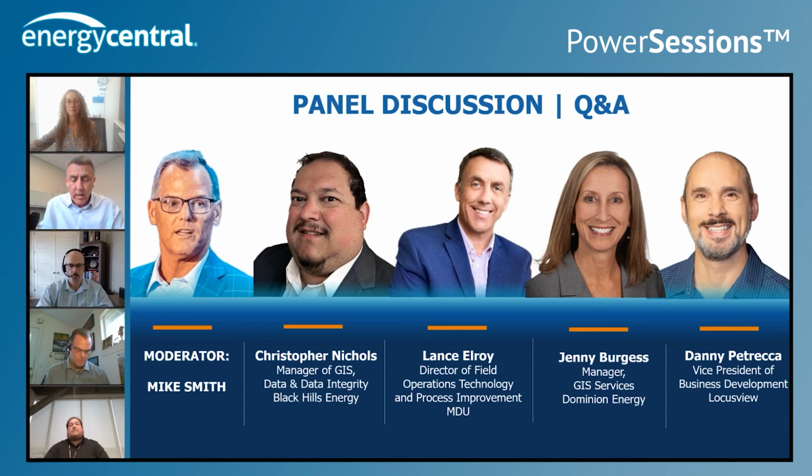Yeah, you bet. So I think going to a digital construction management process and driving work orders out of a central Maximo work and asset system was the starting point. And I think that we went through that process, the mobile solution being Locus View, pushing the work orders out to Locus View. When we capture that data, we're able to capture high accuracy data. We talked about the barcode scanning component, getting the parts right, documenting it in the field. Obviously the big game changer is being able to translate and load that data from Locus View into our GIS system directly. So that translation happens almost a nightly batch process is the minimum. So you get the data out, you get it back into your GIS.